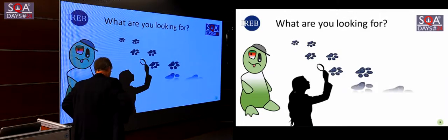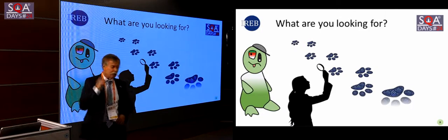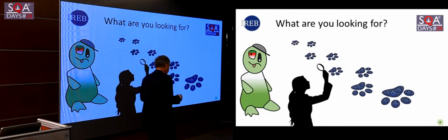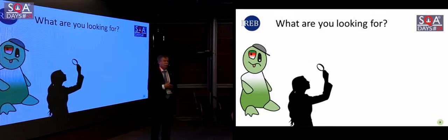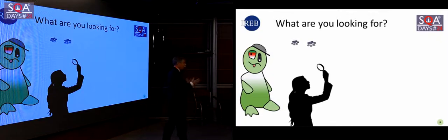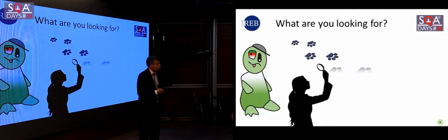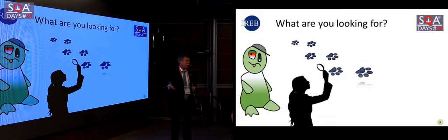manager of the steering committee, the president of the steering committee, says, oh yes, by the way, just before you go into production, you have to ask permission from our audit department to put it into production. Because they have the last say on yes or no, you can use this system, because it was about paying money to unemployed people, etc. And things can go wrong, etc. So the audit department had a say in it.